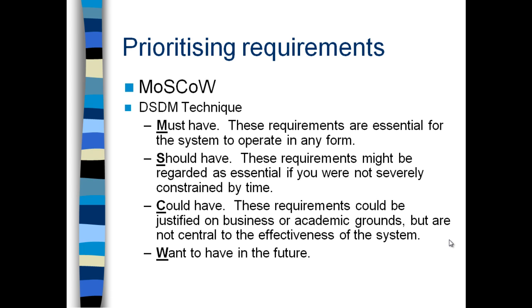We call this MoSCoW, a little funny term, which starts with the must-have. That means very, very important. These requirements are essential for the system to operate in any form. So those are the most critical things, which really define what the system requires.